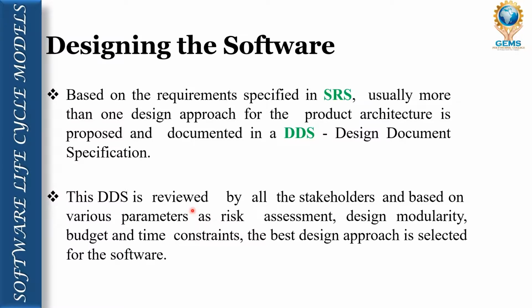This DDS is reviewed by the stakeholders based on certain parameters like risk assessment, design modularity, budget and time constraint. Finally, based on all these four parameters, the stakeholders will pick one of the approaches, and based on that the development will start.